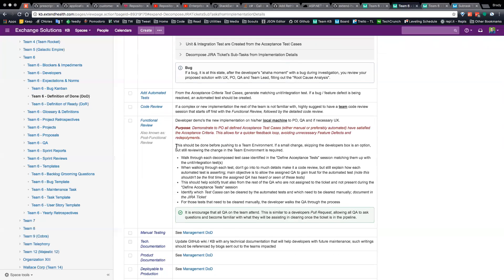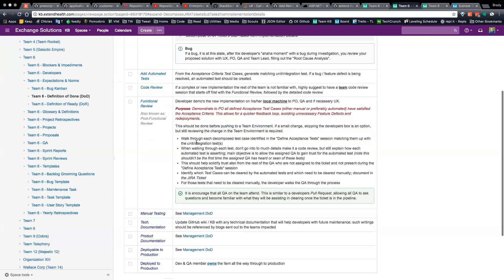It's that whole 'shifting left.' This should be done before you push to the team environment — I don't think that should be a hard rule, but try to do it. If you feel you can't demo this on your local box and can only do it in the team environment, then you need to push to team environment first and then do a functional review. But if at all possible, try to shift left even more and demo it on your box. Here are some steps: walk through each decomposed test case from the define acceptance test session, matching them up with the integration and unit tests. If you have a lot of tests, try to summarize, but explain the steps each test is doing.